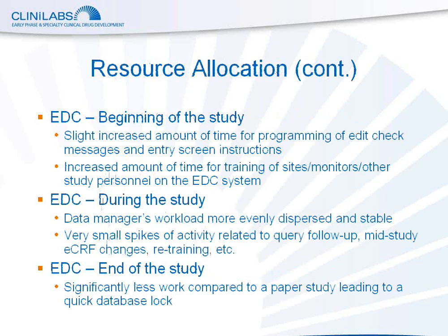In EDC studies, we see a change in how the data manager's workload is dispersed. At the beginning of the study, there is usually a bit of a higher spike of activity as compared with a paper study. This is usually due to an increased amount of programming needed for the edit check messages and instructions, the programming of the eCRF entry screens, as well as the training of sites and monitors on the EDC system. The additional resources and requirements to set up an EDC study need to be accounted for in study timelines as well as individual timelines and workloads.